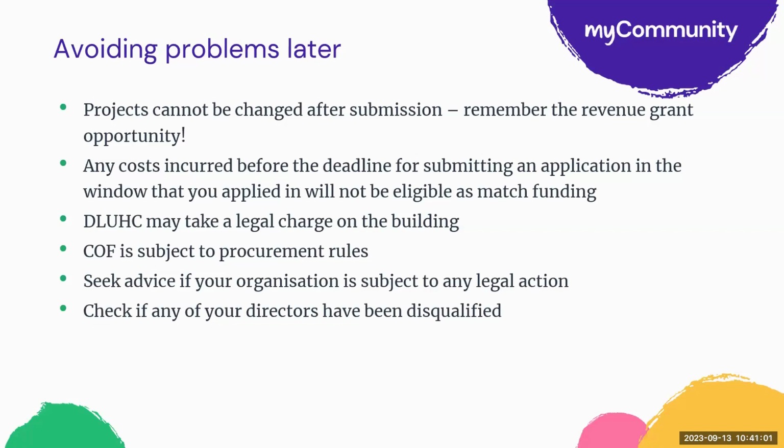So it's really about talking to funders, getting them lined up and aligned with the COF application windows. It's important to know from the start that DLUC may take a charge on the asset, and this may affect the availability of interest rates and on loan finance. And understanding what the COF procurement rules are is really important as well, because if you are starting to put tenders out or getting quotes, they need to meet their criteria, or you might find that you have to do that procurement again. So it's about understanding those procurement rules.